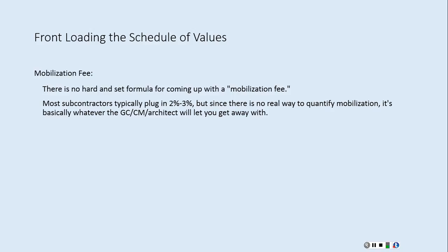Contracting is kind of a strange business. We do a lot of this work, and we wait for it to be justified that we actually did it before we get paid for doing it. So we're always extending our credit, extending our monies every month. We pay the people that are working for us every week, but we don't get paid for their work until the next month. Equipment could be the same thing, but usually that's spaced out enough that by the time we get something delivered, we're able to get paid for that prior to the bill coming, but that doesn't happen all the time.